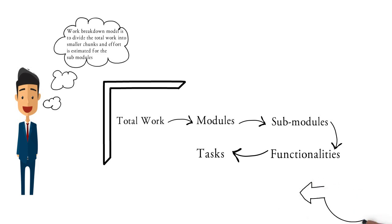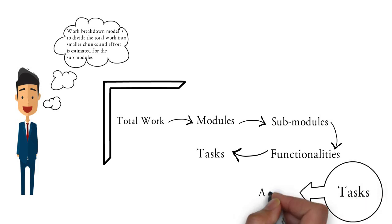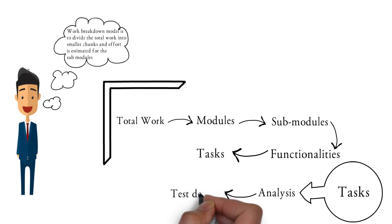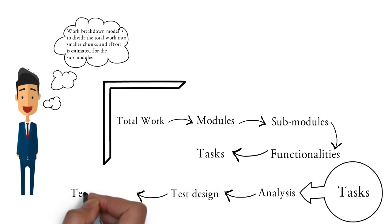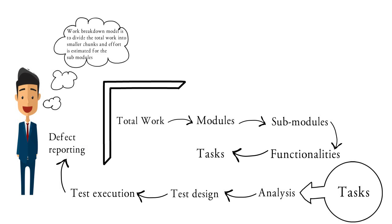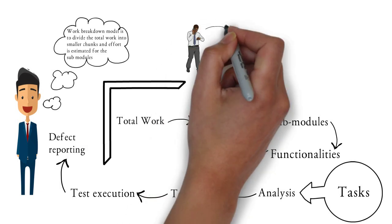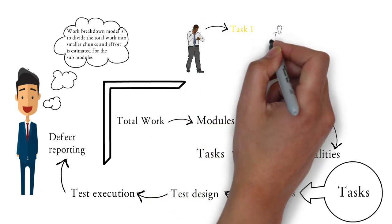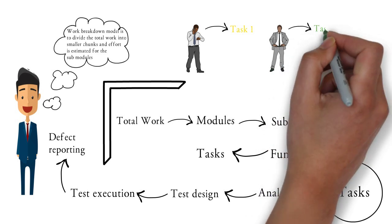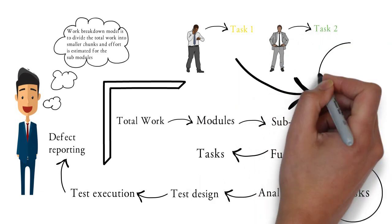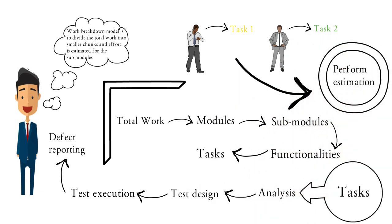For each of the functionalities, different tasks can be assigned, and finally the estimation is performed for each of the tasks. In a software testing project, the different tasks can be analyzing the requirements, designing the test cases, executing the test cases, and finding out the defects. Different tasks are assigned to different testers and they do the estimation, so finally the total effort required for completing the project is arrived.